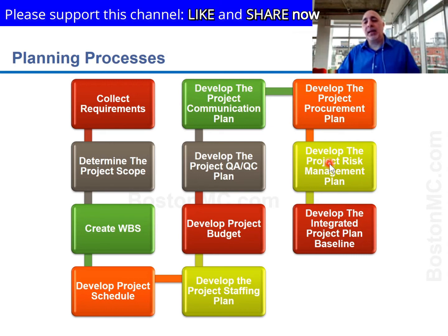And then once you have all of your plan together, you should ask yourself, what could go wrong? And for these things that I think could go wrong, what should we do to mitigate them from going wrong? And that's called the risk management planning. Then you come up with your response to the risk, which is called the mitigation plan. And then you adjust the overall plan for how you want to do this. This is how you plan out your project in a professional fashion. Leaving anything out could cause problems for you eventually.